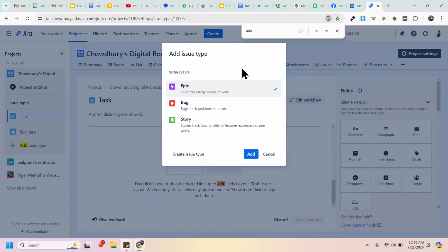They would have created epics for those pieces of work, categorized into two kinds, where something spans for 4 weeks, a month, and some work takes about 6 months to complete. Now within that work, we would still be breaking that down into user stories or tasks.